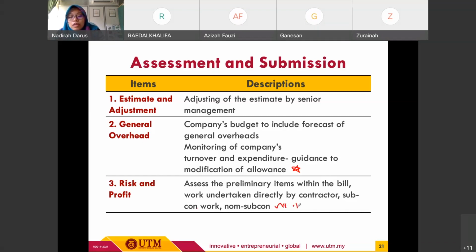They will review and check again the allocation, the allowance or rates for the profit, so that they can try to predict any potential risk related to the financial allocation. That's why this assessment is necessary. At the end, they can foresee any risk occurrence, and then they can prepare a contingency plan.